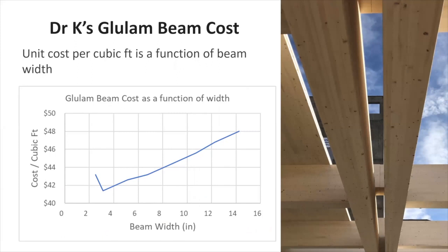Theoretically, if we just think about material cost, and don't think about erecting number of pieces and so on, just material cost, the cost of those 2 girders is less than the cost of the same amount of wood if it had been ordered as a single girder. I think that's a really interesting point, and it certainly helped drive us towards a solution here, which also was helpful later on in terms of connections, which we'll discuss later.